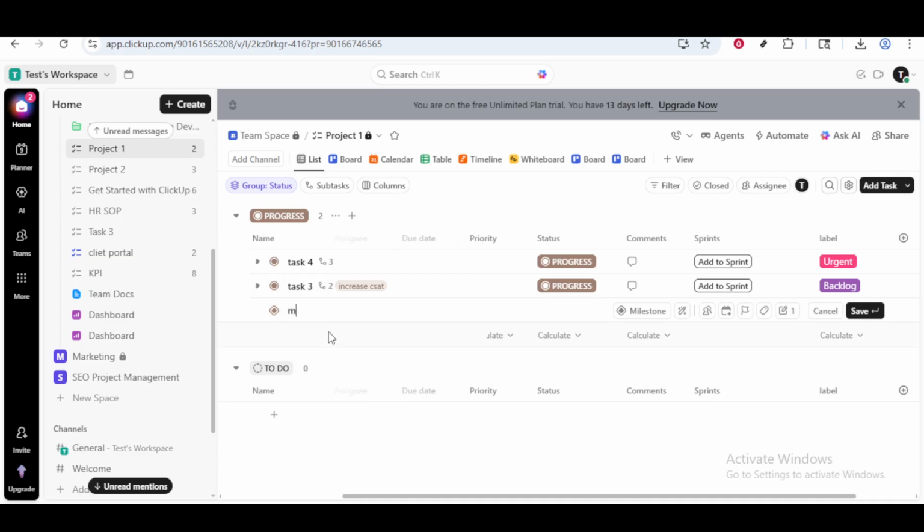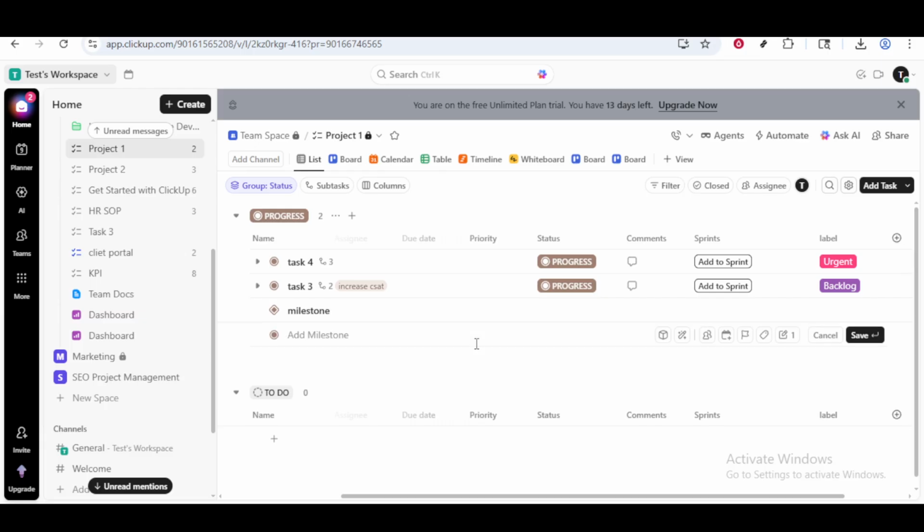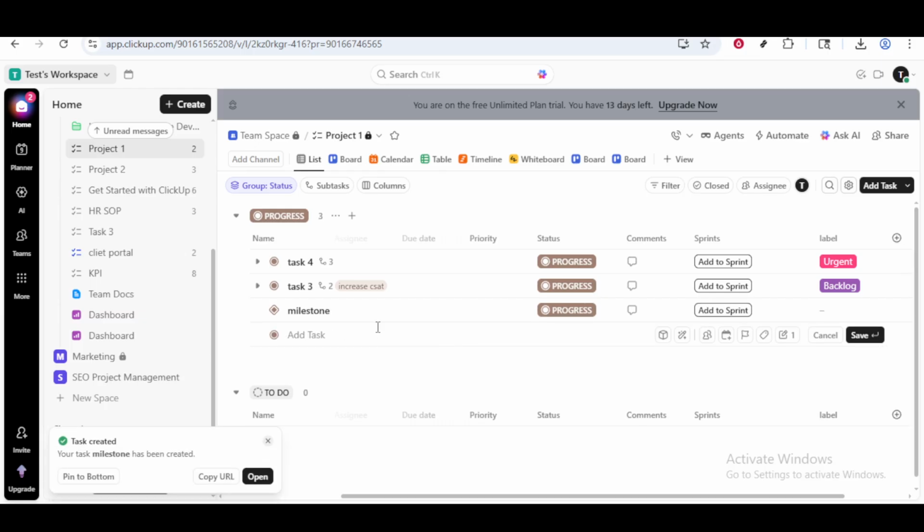Click on your chosen task. This action opens up more details about the task, including any subtasks, timelines, and notes associated with it. The Task Detail panel is your main control center for modifying and tracking individual tasks, which makes it perfect for setting key achievements. With the task open, your next step is to find and click on the option labeled Milestone.